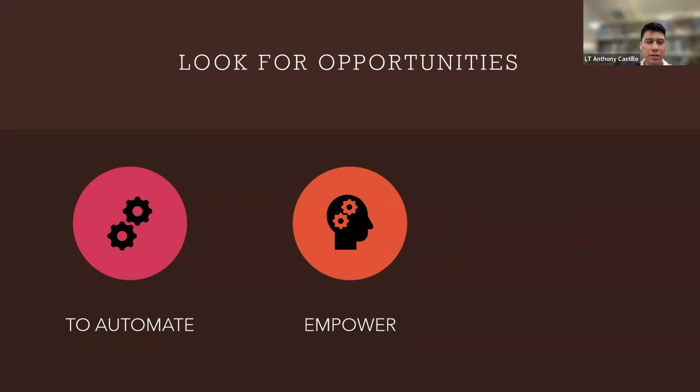Is it cost plus? Cost plus incentive, right? Cost plus award fee, right? Those are the two common ones. Those are best effort contracts. A fixed price is a whole different ball game, right? It's like, I'm going to give you a gob of money. It's on you. You deliver when I say, and then I'll judge what you actually deliver me.